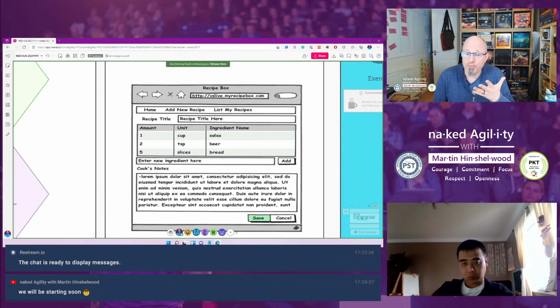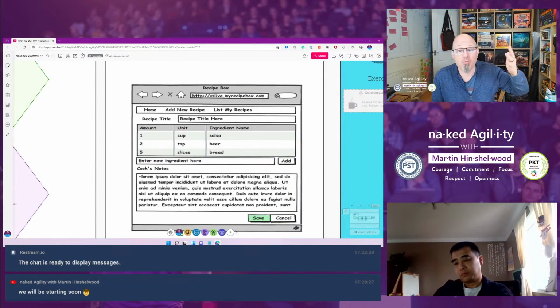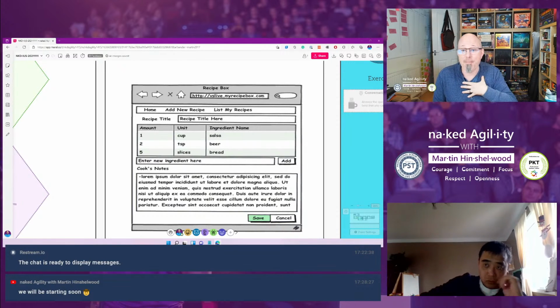Right? That's why, how many times is user story mentioned in the Scrum Guide? Does anybody know? No. It's 0. User stories are not mentioned in the Scrum Guide. Story points are not mentioned in the Scrum Guide. These things are not mandatory to be doing agile practices. They're just things that have worked for other people and they've talked about. Right? And they may work for us and they may not within our circumstance.